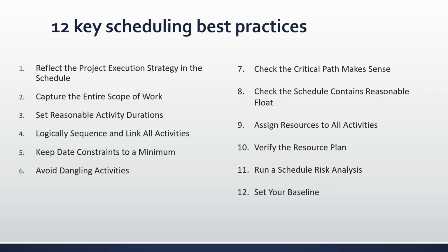Since the critical path determines the project's earliest possible completion, extra focus, energy, and attention should be spent on critical activities. If your critical path runs through your management activities, the schedule should be carefully examined and challenged. Number 8, check the schedule contains reasonable float.